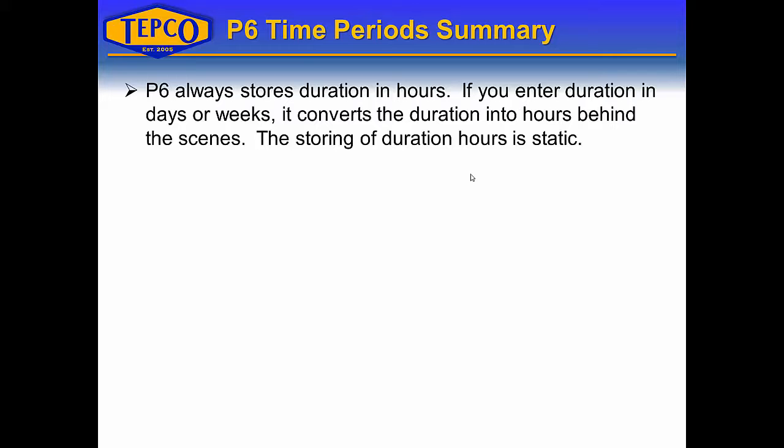The storing of the duration hours is static, so the hours that are stored will not change if you go and change your time periods. But the way the durations are displayed can change. So if you are looking at it in days or weeks, those things can then alter based on how you have made the change to the time periods.